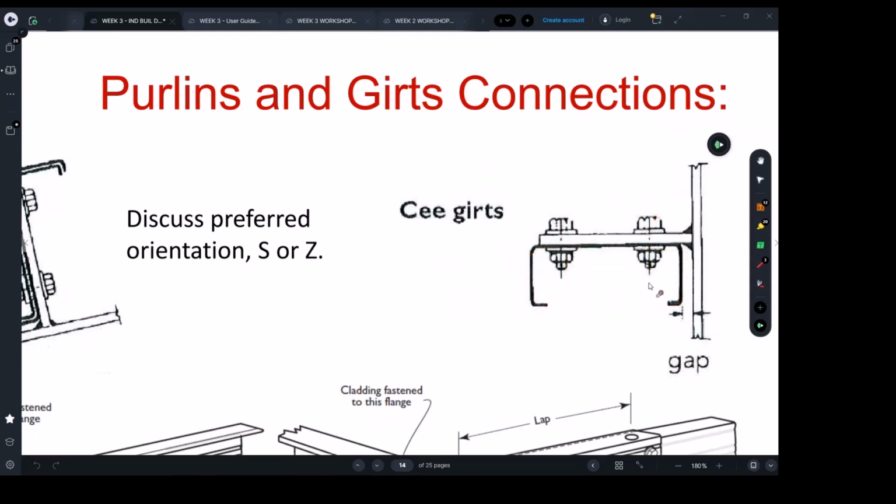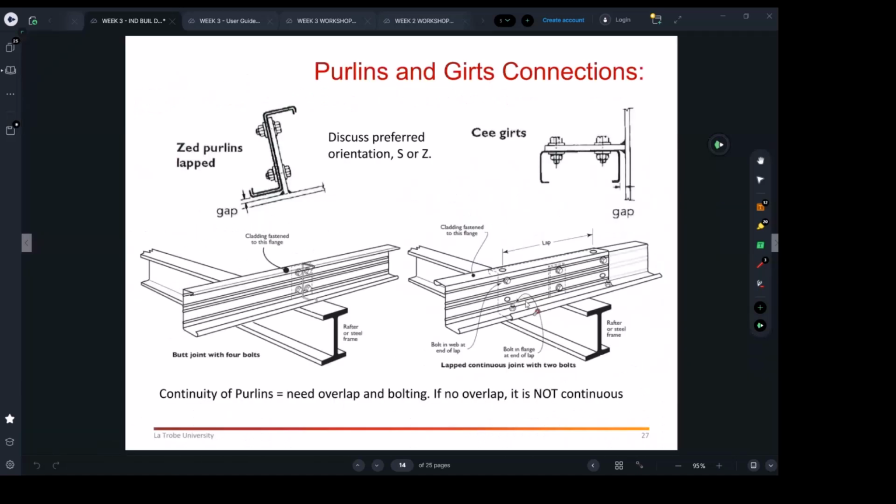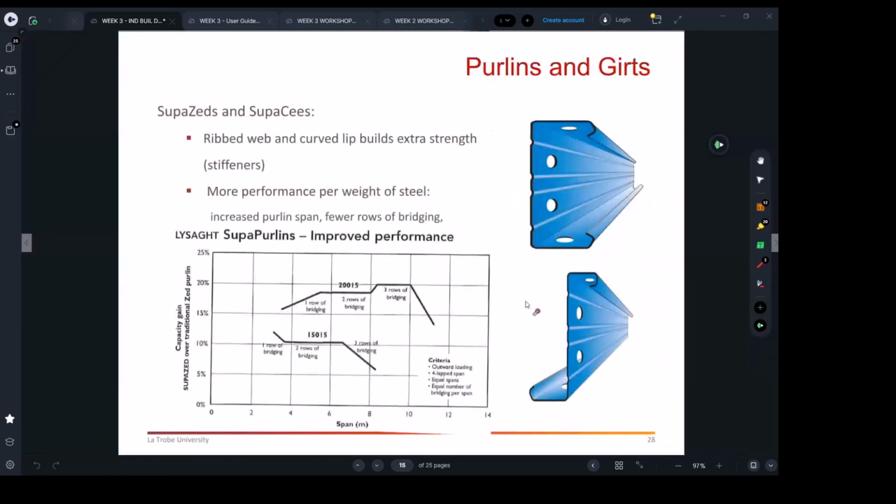This is where you have to look at the contracts, the engineering drawings and the architectural drawings, and what they are showing. That's how you need to guide your contractors. Maybe the engineers did not talk about how to put them because it does not really matter a lot for engineers. Architects the same, but you don't want your contractors to place them like this because it will cost them days and you're going to pay for those days. You can guide them to do it differently, and that will save you days, right?